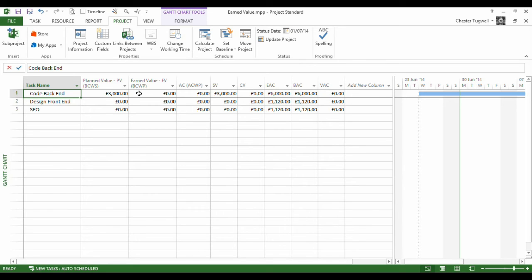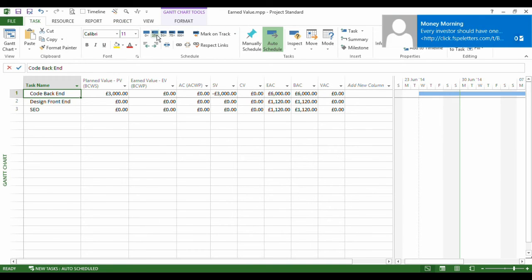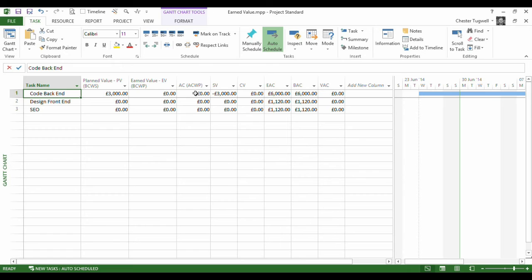The EV or earned value field is currently zero because we haven't actually gone in and said that we've completed any of the task. The actual cost field is also at zero because that would look at what you've actually spent. The difference between the two is this will tell us what you've actually spent and this will tell you what you should have spent if you'd have done that work according to the cost on the baseline.